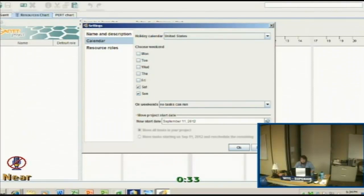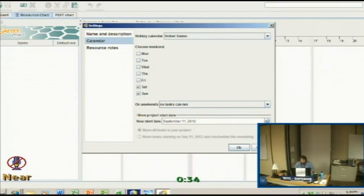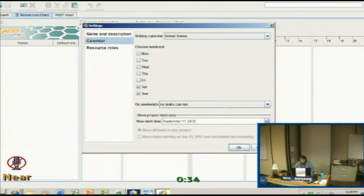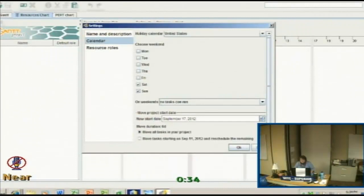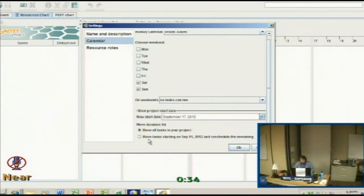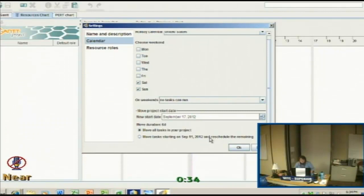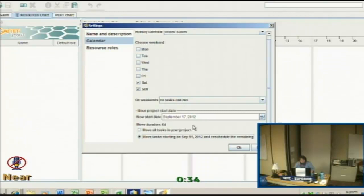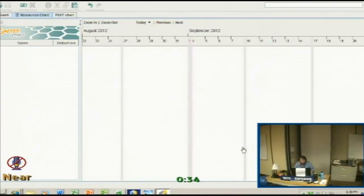Now I want to select a start date for my project. What day do I want my project to begin? And you can see today's date has been selected. But let's say my project really isn't going to start until next Monday. Right now I'm kind of just setting this up in the software. I can click over here to the right, show calendar, and I can select a different start date for my calendar start date. I'm going to click on September 17, 2012, as the actual start date of this project. When my company is going to begin this project. And I'm going to, down here, move tasks starting on September 11 and reschedule the remaining. Well, I haven't really created any tasks yet. I'll show you how to do that in a moment. But I'm going to click on that button anyway, even though I haven't created any tasks yet. I want all tasks starting on September 11. I actually want those to start on September 17. So I'll click on that.